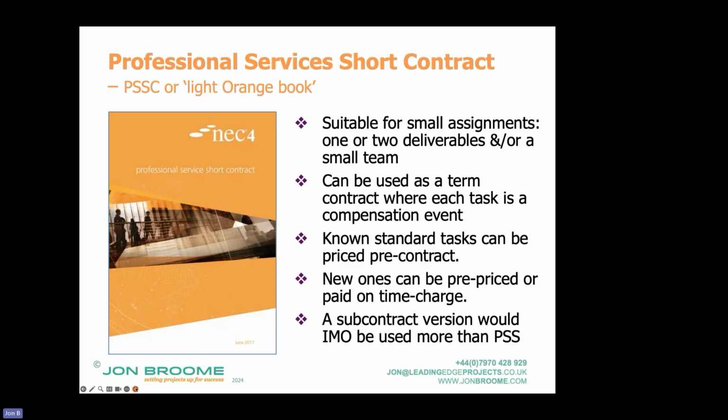Some of those tasks which I might instruct, I can predefine, in which case you price them up in the price list. So let's say it's a surveyor who does house or flat surveying. You could say, give me a rate for surveying a single bedroom flat. And you just instruct them to go and do it, and you use that rate. Give me a rate for a 2-bedroom house. Go and do a survey, etc. Those could be predefined. It also says, give us the rate per hour, per day, or whatever of the consultant.